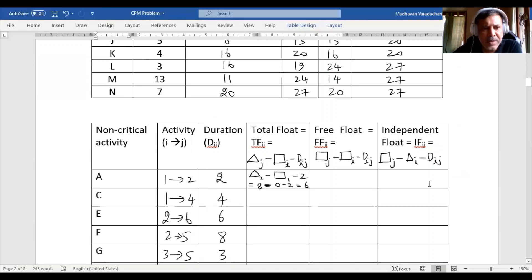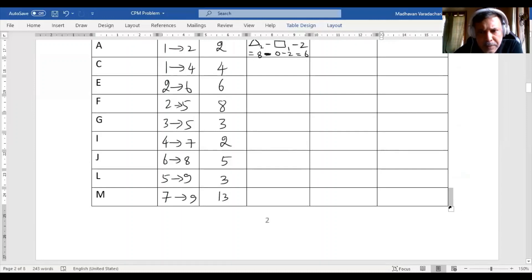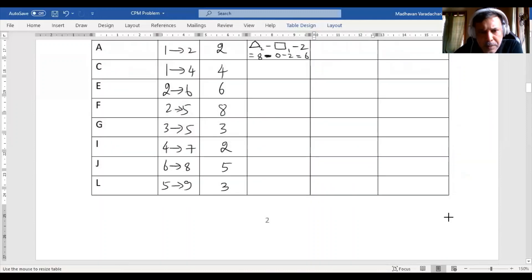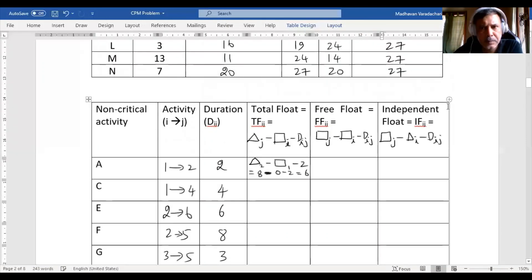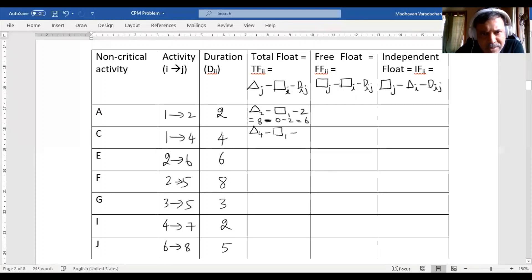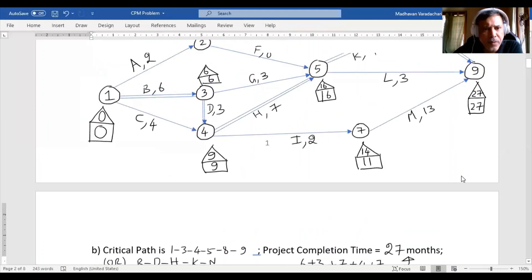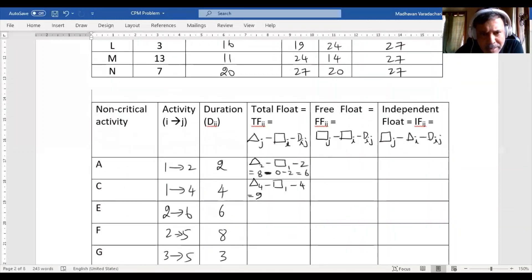Using the same methodology for activity C (node 1 to 4): total float = triangle_4 minus rectangle_1 minus duration = 9 minus 0 minus 4 = 5.